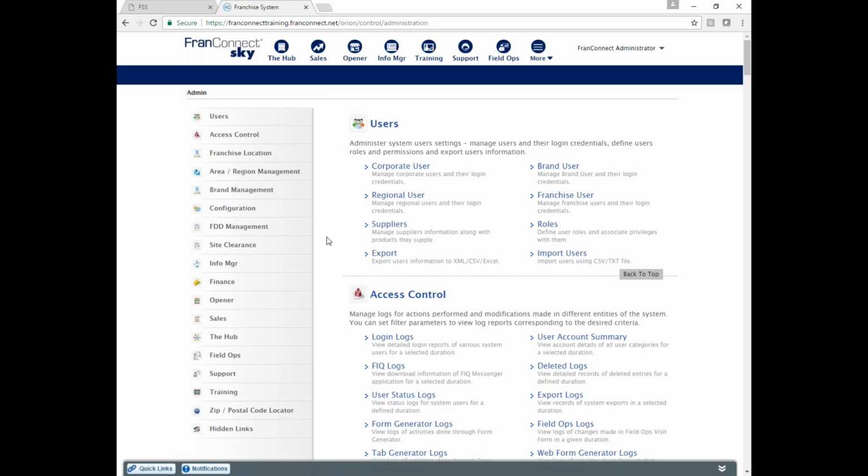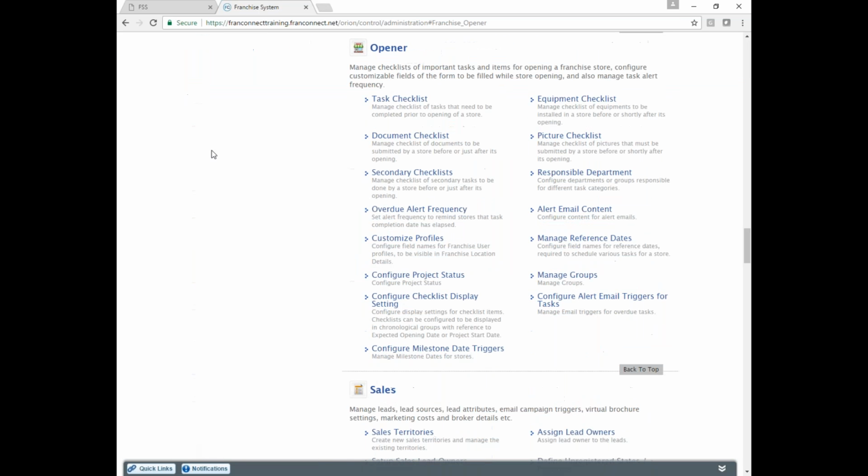If that were not enough alerts for you, you can also choose to send additional alerts based on criticality. So you can say for a really critical thing, send another email that says, hey, this thing is overdue, and it doesn't have to be sent to the owner. It can actually be sent to escalate to maybe the project owner or a backup person, secondary person.